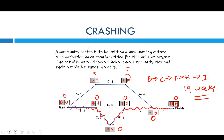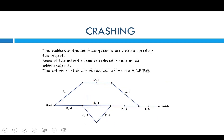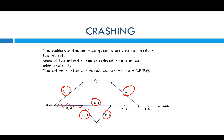Let's have a look at the next question. The builders of the community centre are able to speed up the project. Some activities can be reduced in time at additional cost. The activities that can be reduced are A, C, E, F, and G. However, A, G, and E are not in the critical path — the critical path went the other way — so reducing those will not reduce any time for our project. Only C and F will work.